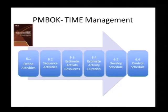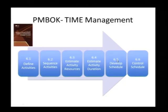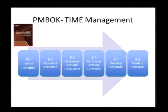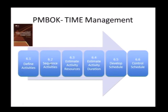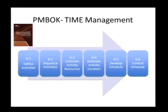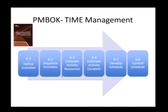Coming back to the original question about iteration: the sequence of steps is generally reasonable, but there will be iteration. You might develop the schedule and find you are not meeting the target, then go back to re-estimate resources or even change the sequence of activities, or even redefine activities entirely — for example, deciding to switch from cast-in-situ construction to prefabricated construction, which changes the activity definitions themselves. So there is an iterative process without a doubt.